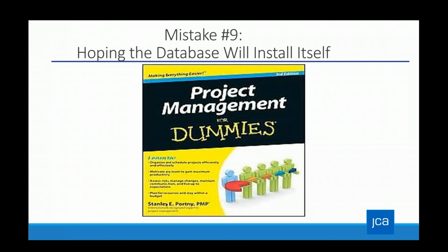this project. You also need to think about what other than installing the software and configuring the software, et cetera, what else needs to happen? So how much time are you going to need to devote to cleaning up your data or rethinking your data, rethinking how you're going to track various things? How much time are you going to need to spend integrating this new system with other tools and testing those? So it's not simply installing a piece of software and migrating your old data and everything magically fits.